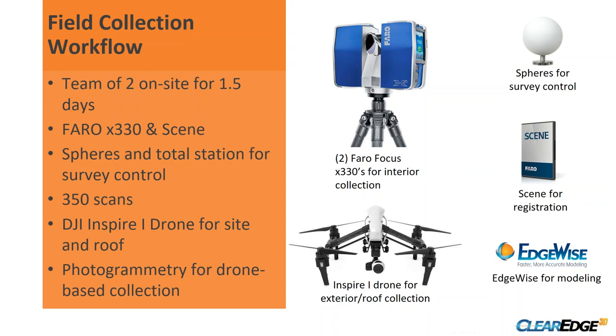We also did not want to get on top of that roof. We were just starting to get into the drone work at that particular point in time, so we brought along our drone. We took a look at what it was going to take to get on the roof and just how much data was up there, and decided it was a good application. So rather than getting on the roof with a scanner and getting all the equipment up there, we went ahead and just flew it with the drone.